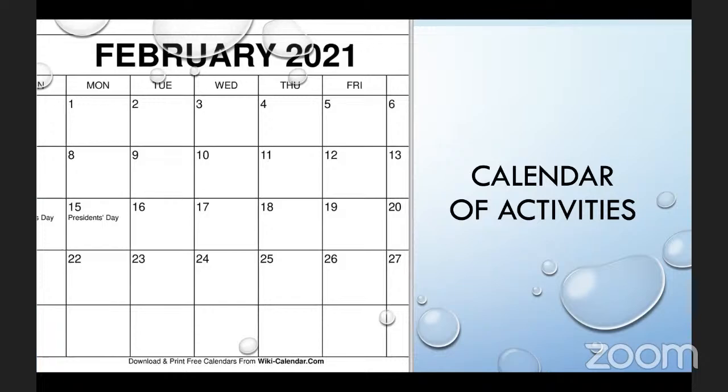Usually, bring an ample number of stories to this type of ceremony so that you don't waste anybody's time. You can have the storytelling estimation maybe twice in the sprint, or even sometimes twice a week. As you write stories, make sure you are scheduling these storytelling estimation meetings so that they're on their calendar. They know that every Thursday, from 2 to 3, or maybe from 3 p.m. to 4, or 3 to 3:30, they have a meeting on the calendar that says estimation meeting.